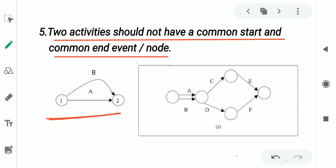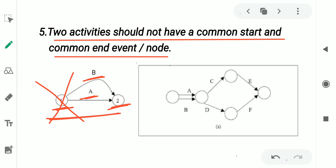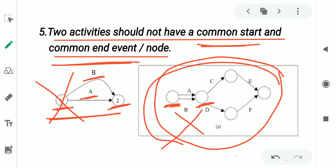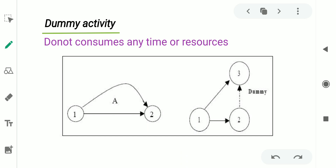The fifth rule states that two activities should not have a common start and common end event. In this figure, activity A and activity B both start from event 1 and both finish in event 2. This is a wrong representation because it violates rule number five. Similarly, in another figure, activity A and activity B both start from the same event and both finish in the same event — they have a common start and a common end event — so that network is also incorrect.